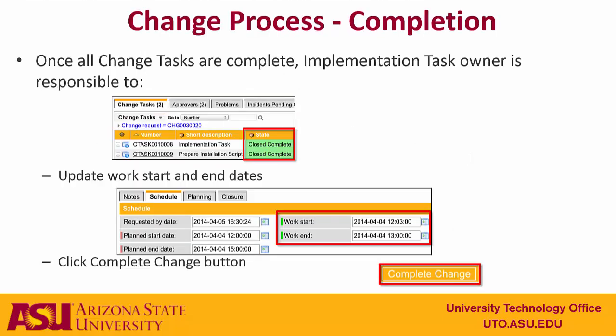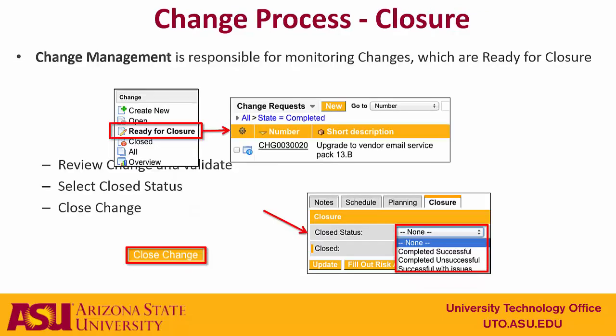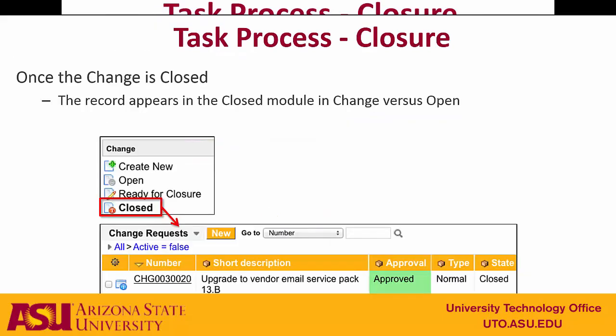Once all of the tasks associated with a change record are done and are marked close complete, then the owner of the change record will go in, set the actual work start and end date, and click on the complete change button in the change record. The change management group will find that record in the ready for closure list. They'll review it, put their own notes in the closure tab, and then click close change. Once they do that, your change record will appear in the closed list from the change application.